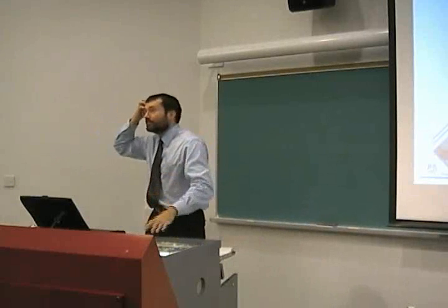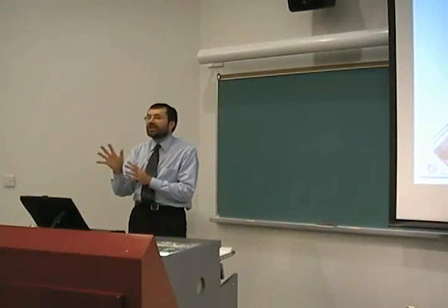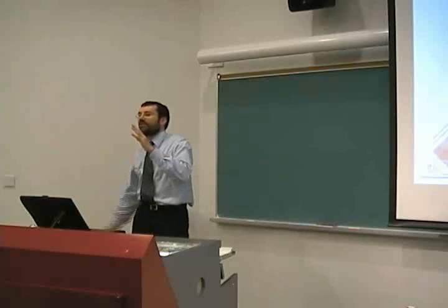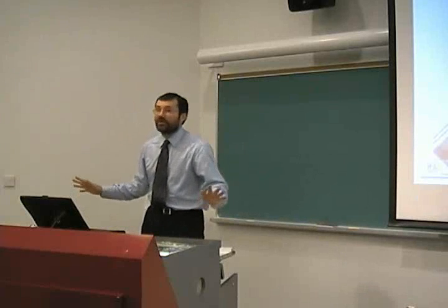You might say, we're not going to do this. It's going to add extra cost. It's going to slow us down, even if it's relatively small. And sometimes you might say, well, we can do two or three, four of those changes, but if we try and do the 25 things they want, that's going to put us way over budget. So we're just not going to do those at this point.